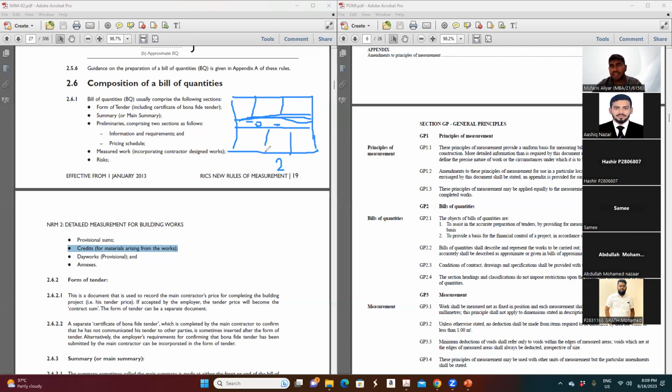Okay. So when he's demolishing that, the existing equipment which is in a usable condition, or existing materials which are in a usable condition, can be reused by the contractor, or the contractor will demolish or take them out from the building. Then he will go to the market outside and he can sell it. So those items are to be priced also by the contractor.